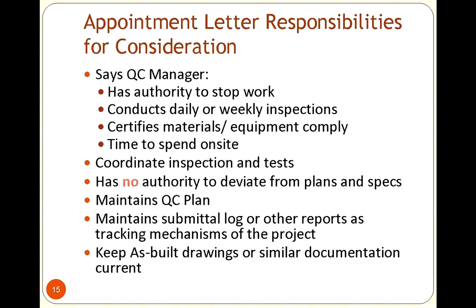So one of the things that we also did with the nitty-gritty details was we would essentially write a quote-unquote letter. A letter was just really a documentation of authority, and it really puts the teeth behind that responsibility matrix that I was just talking about, where we would say we've got a person that we've identified as a point of quality control. This person is someone who is a bit of an enforcer but doesn't have total control. So, they can't just control anything in the project. However, if they do see a problem, they have the authority to stop the work is something we would put